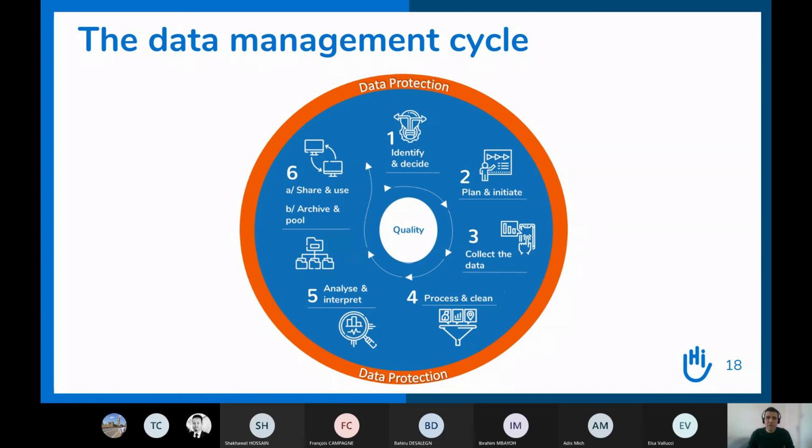So it depends. My recommendation is to try to go for the first option. So in the source of verification, mention that you want to have only a digital database, and this way you will be able to destroy the paper files as soon as the project is completed.